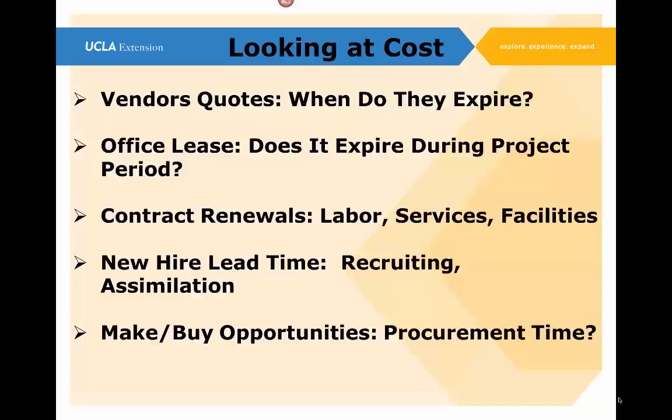If we're going to do any hiring, any recruiting, what about the lead time on finding somebody? What about the lead time on recruiting them, bringing them in, interviewing them? A number of people will apply for one position, and we'll look at a lot of resumes, and then we'll look at a lot of people, and then we'll only be hiring one.